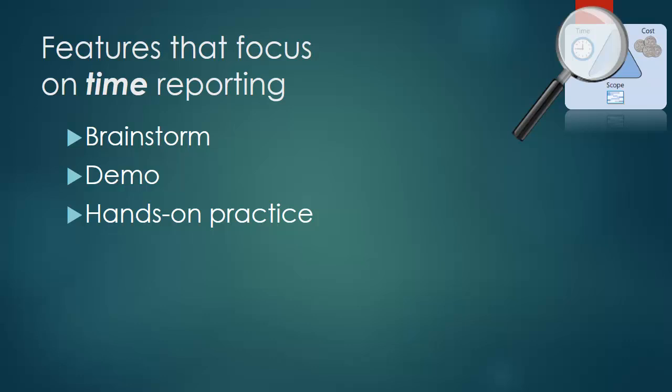Critical path. So let me ask you this. Who's ever heard the term critical path misused? Because I think we know the technical meaning. I have this little game I play at work. It's this little mental drinking game where when I hear somebody say, you're on the critical path, or this is now a critical path, and I press them on what they mean, they never mean the technical meaning. And of course, we know the technical meaning is that sequence of activities that is driving the finish date of the project. That is all critical path means.